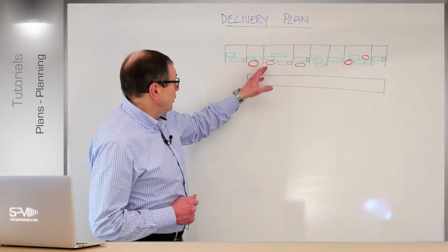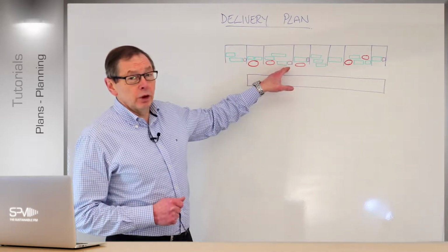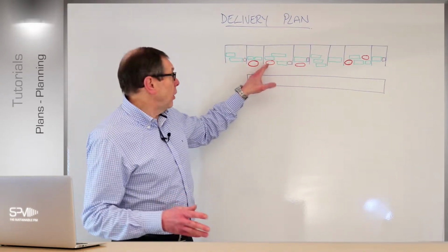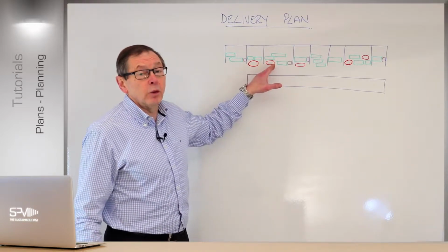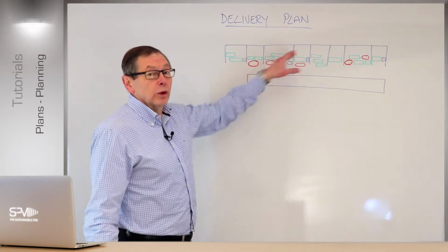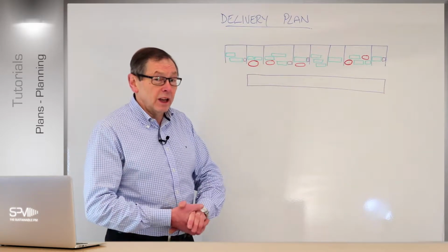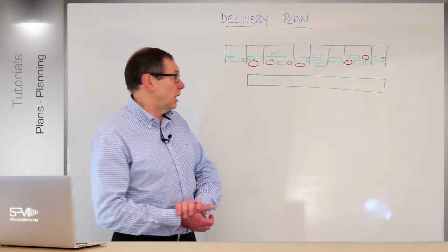So I might have, say, 4 weeks worth of working here from a time box point of view, and only 1 week's worth, which might be maybe in 2 weeks, but the whole increment's controlled by the time box. So the 2 weeks worth that maybe end up on the work package is okay, it's still within the 1 month time frame, or the 4 week time frame for that increment. So you get the picture, you can control both ways. Again, it's about applying what the project needs and how you want to deliver the solution at that point.